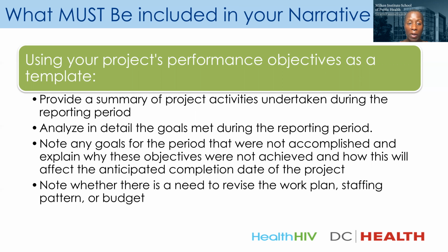Any goals for that period that were not accomplished, you'll note why these objectives were not achieved, and how this will affect the anticipated completion date of the project. So in this narrative, you get the chance to tell your funder or your program manager for the funding agency why you have not accomplished your goal.